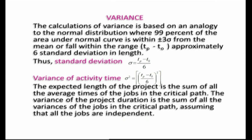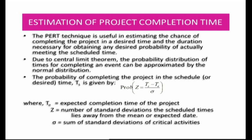The expected length of the project is the sum of all the average times of the jobs on the critical path. The variance of the project duration is the sum of all the variances of the jobs on the critical path, assuming that the jobs are independent. The estimation of project completion time in PERT is useful in estimating the chance of completing the project in a desired time. Due to the central limit theorem, the probability distribution of times for completing an event can be approximated by the normal distribution.